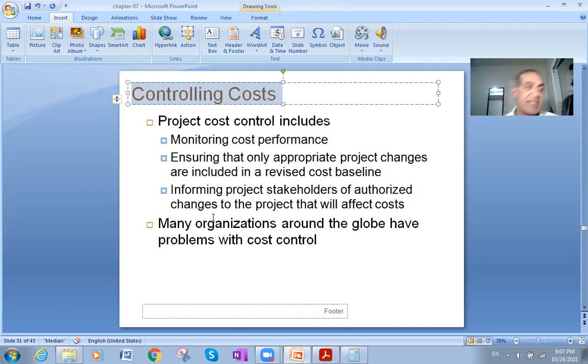The control process is just to check if the work is done based on the criteria and the standards. So you will compare the actual performance and the planned or the standards, just to find out if there is deviation or no. If there is deviation, we have to check what kind of deviation this is. Is it positive deviation or negative deviation? Positive deviation, as management we should enhance and encourage. Negative deviation, no, we have to correct it, but not to catch the mistake.